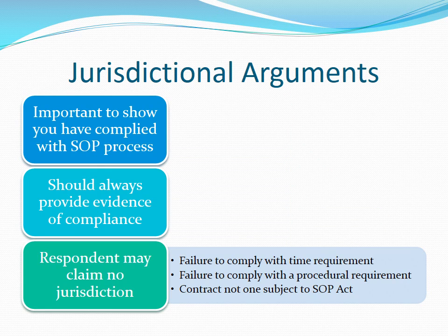Jurisdictional arguments generally will only be raised by the respondent. Essentially, all a jurisdictional argument is that the claimant has not the right to have the payment claim adjudicated. Jurisdictional arguments have no bearing on whether the respondent is liable to pay the claimed amount or not, only if the security of payment process is available for this claim. For example, if the contract is not a construction contract as defined by the Security of Payment Act, then the matter cannot be adjudicated under the security of payment process.